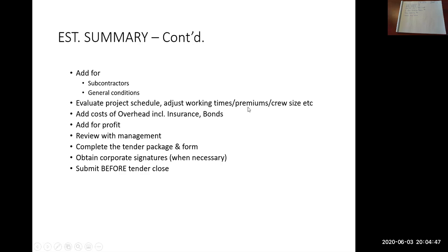Sometimes there's a premium for that. Maybe you don't have extra crews. Maybe you need to hire more people. Maybe you need to hire a sub that can help you install pipe. So there would be a premium for that. Maybe you need to add more equipment so that you can do things quicker. Maybe that pipe crew with 1 excavator, maybe you need to rent a 2nd excavator so that it allows you to install pipe quicker. So some examples.